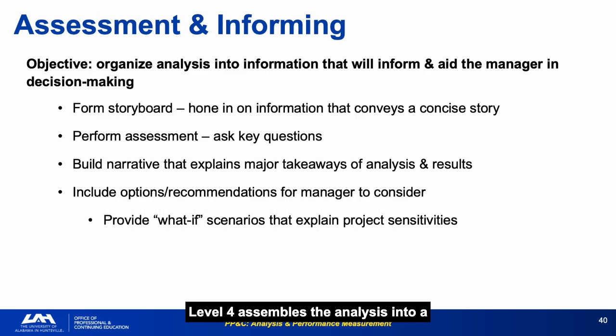Level 4 assembles the analysis into a storyboard, honing in on the information that conveys a concise story, asking key questions, building a narrative, including options and recommendations. The storyboard is a physical or virtual organizing tool. It forces the analyst to decide what is important before they start building the briefing.